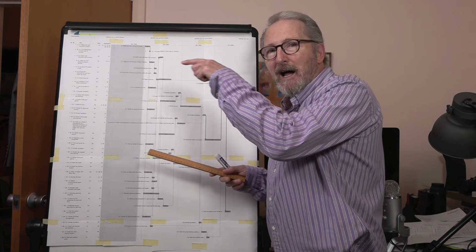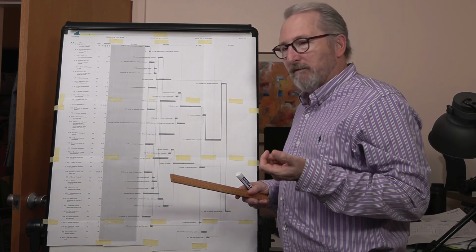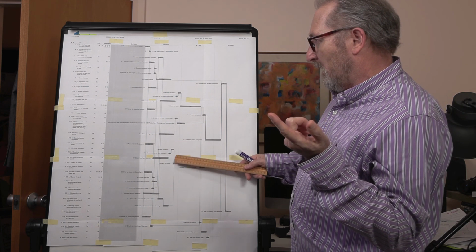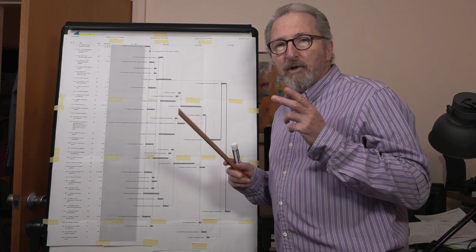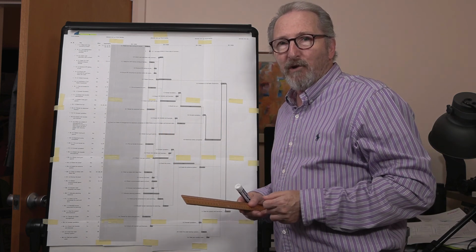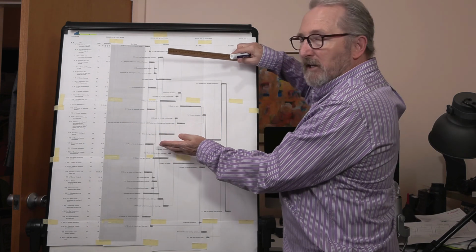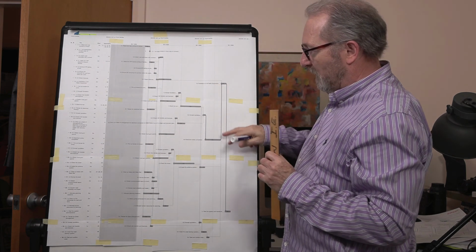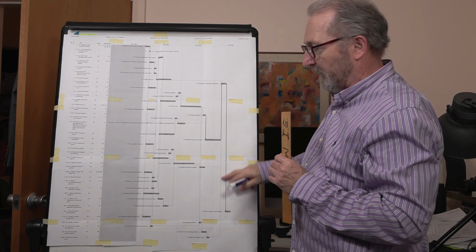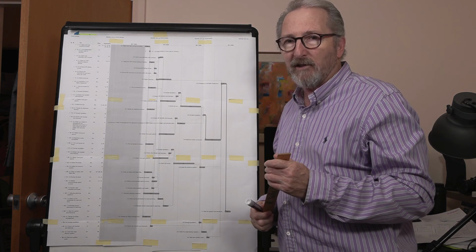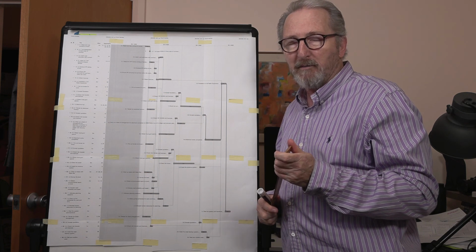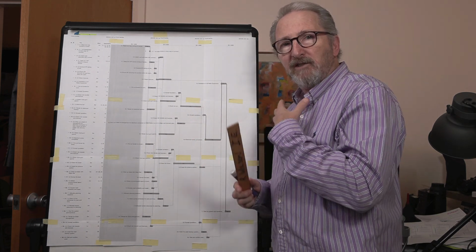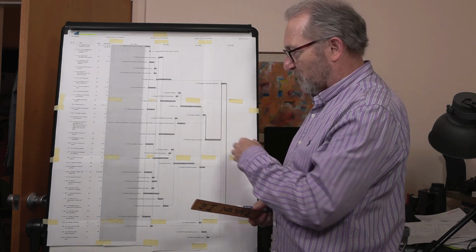I've got 2 paths for the construction, one for erecting the tower, and one for building the hut, which are both 8 weeks in duration, and therefore the software didn't know which one to go with for the critical path, so it only drew the critical path for the very last part of the map. And I guess it hoped that the creator was able to be smart enough to track it down. But it's amazing, as soon as it was on the big picture, to be able to stand back and look at it, and I saw that straight away.